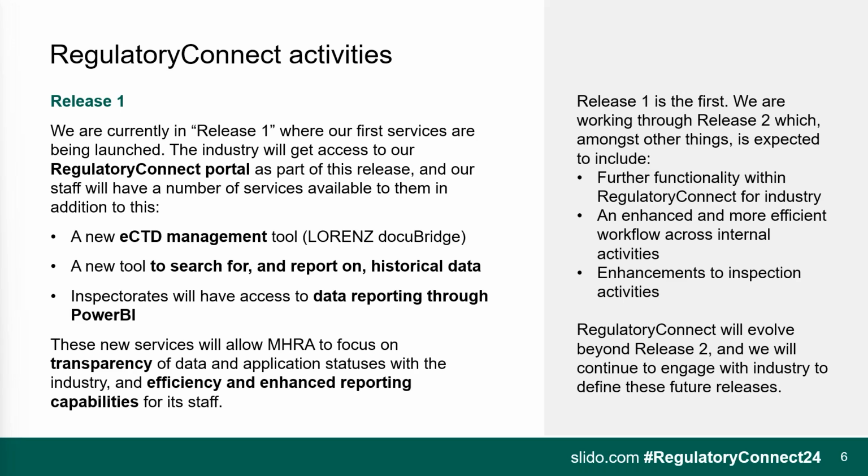So we took a view a few months ago, when we were looking at the previously known RMS project, which was subject to some delay, to try and break it up into release cycles so that we could get some low-hanging fruit and get some features and functions of the program out earlier than the previous plan would otherwise have made possible. So we are in the midst of delivering release 1.